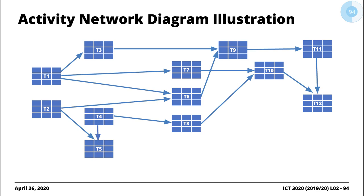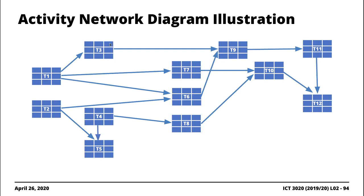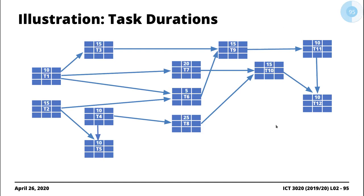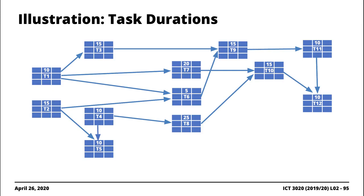After completing the dependency tree, we indicate the durations associated with all the different activities. Once the durations are added, we go through the forward pass. For the forward pass, we start with the initial tasks — tasks that don't depend on anything at all. We go through the tasks in sequence: T1, T2, T3, T4, all the way up to T12.